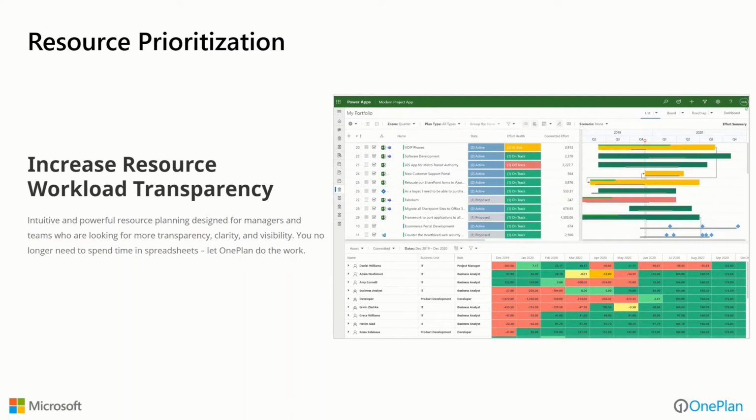Resource prioritization, to be able to look at what-if scenarios in here and look at the portfolio that we're proposing to embark upon, and then look down below at what the resource constraints might be and see: do we even have the bandwidth, or are we overcommitting by looking at this portfolio? And looking at things like, should we stagger our projects differently or should we deselect lower priority projects?